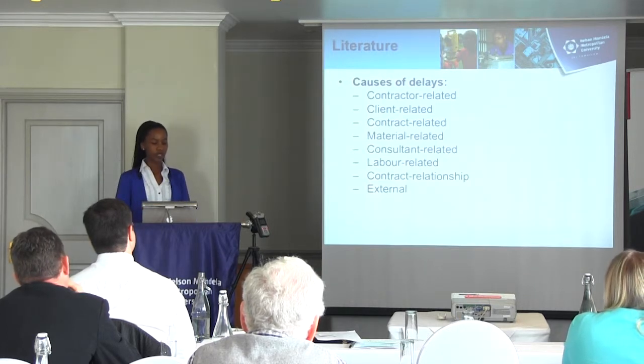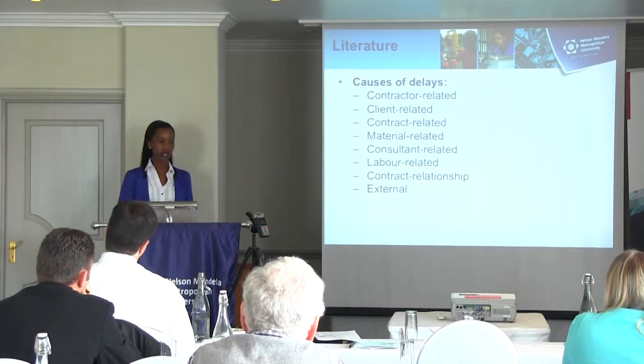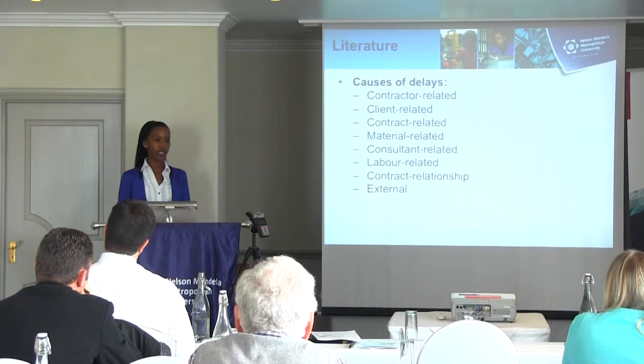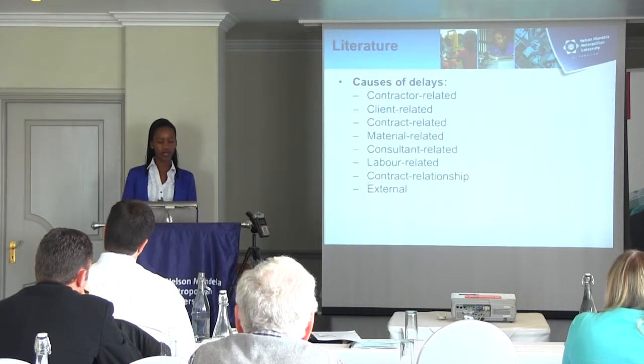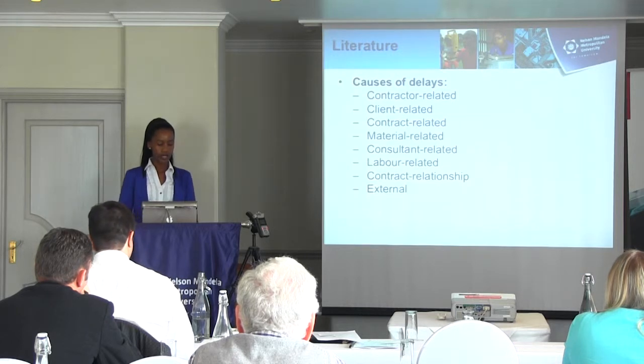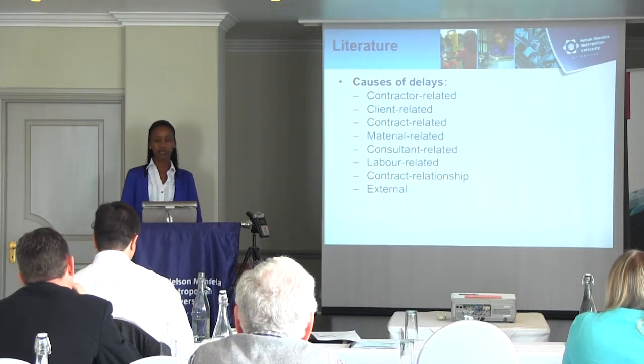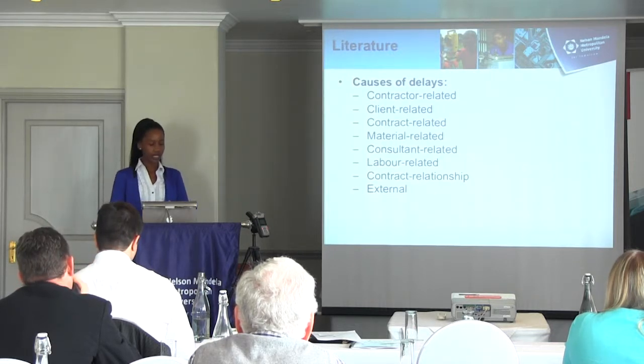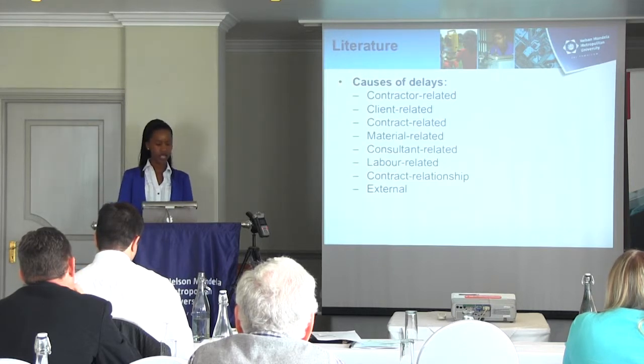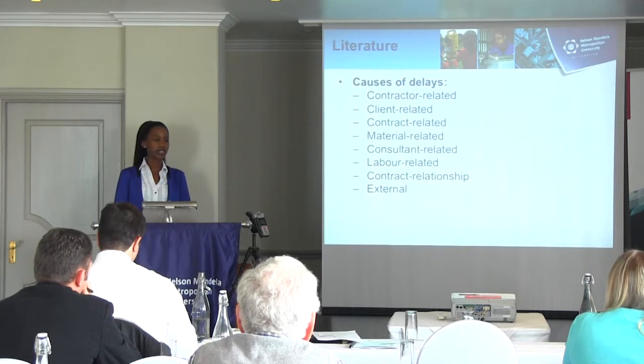Another category would be consultant-related. That's now the quantity surveyors, the contractors, the principal agents, architects, all the various stakeholders in the construction industry that are involved in a project. The next category we have is labor-related issues, such as labor strikes and low labor turnover. The second last category would be contract relationship factors, and the last one would be external factors such as weather.